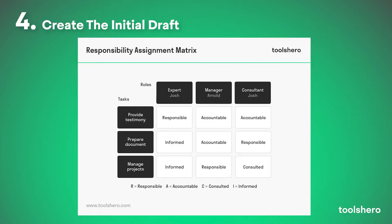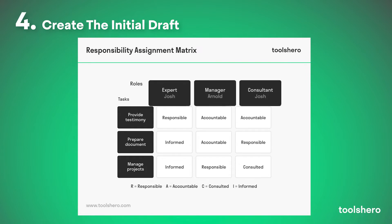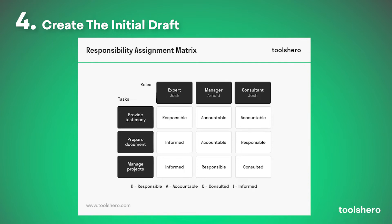Step 4: Create the initial draft of the Matrix with the activities in the left-hand column, and the team members at the top column. In this draft, enter the roles that each person will have in the form of a RACI matrix, assigning for each task whether a person is responsible, accountable, consulted, or informed.